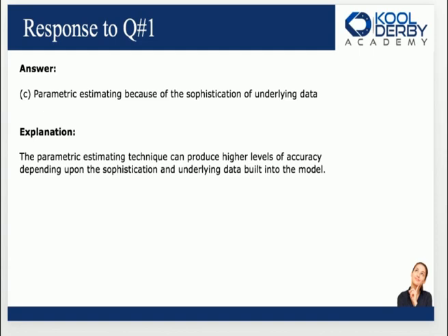But it is a model and it is an algorithm, so it's going to give you a little bit more accuracy. The other part to consider, though, is that it does take longer because you're collecting more information. And because it takes longer, it costs more. But because it takes longer and it costs more, it usually is more accurate. Yeah, I hope you see that. The quicker, cheaper way is called analogous estimating, because you just go and get the information from previous projects. It's also decent as far as estimation, but if you really want to nail it, you probably will do some kind of parametric estimating.